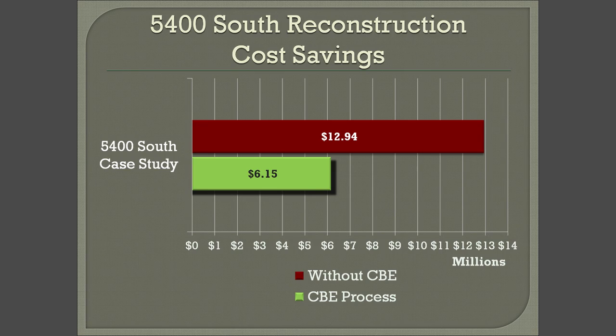We did it. The design was complete, was advertised. We were lucky or good or whatever you want to call it. The price came back right there where we said it's going to be. Now you see the saving there, $12.9 million to $6 million. If we were doing the Band-Aid, that means 2 years later we have to do the same thing again. Look at the public. Public is going to say, what are you doing? You just closed that 2 years ago.